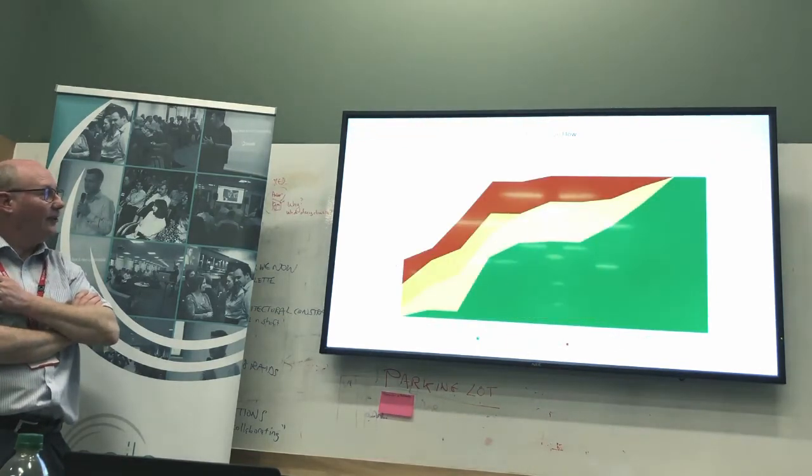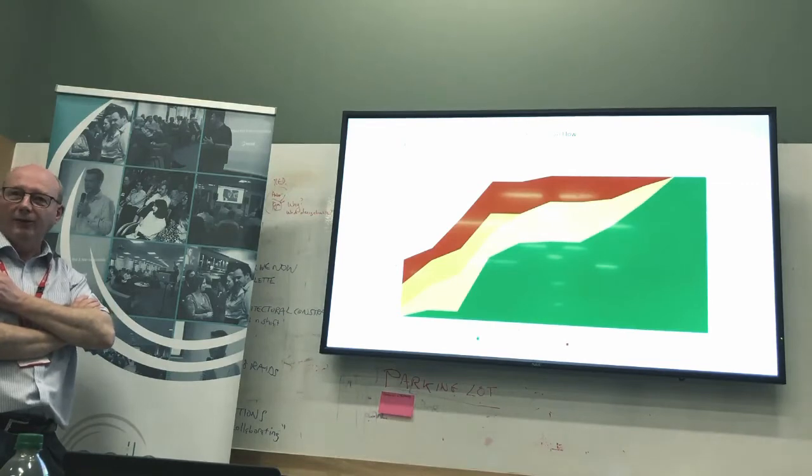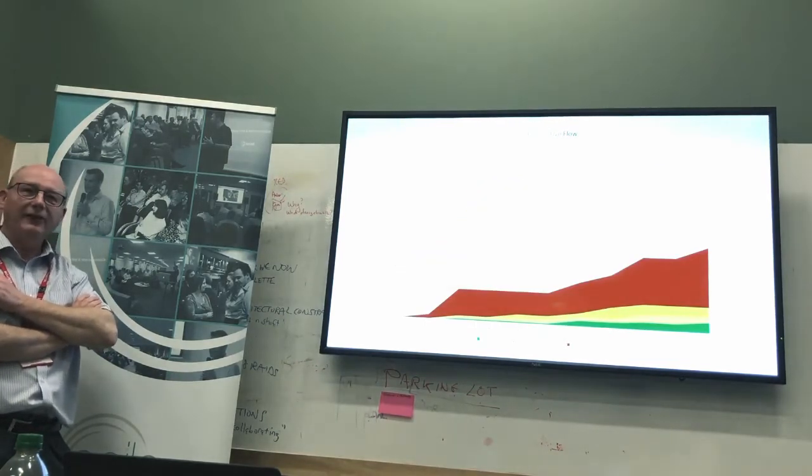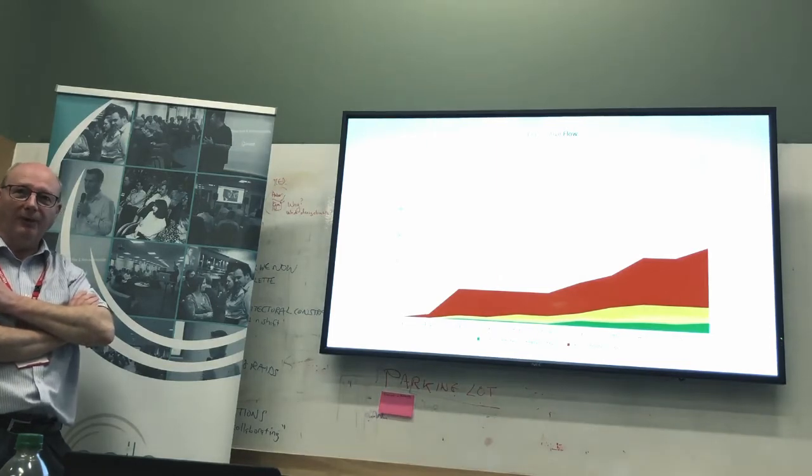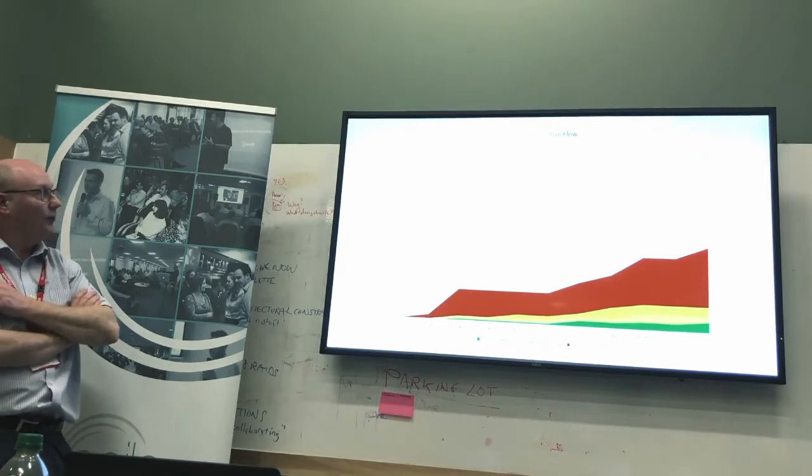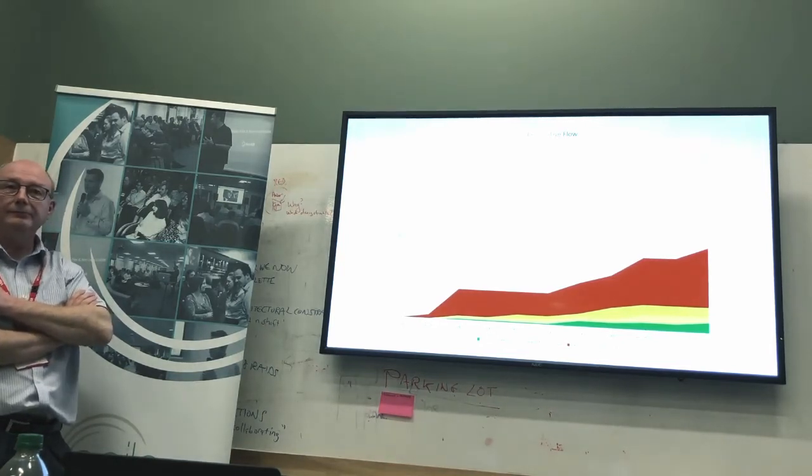So they'd done this, they'd eaten all the backlog, made a delivery, patted themselves on the back, but they hadn't done any planning for what was going to happen after that big delivery. So there was no backlog. So they spent the first 4 days of the sprint writing stories.